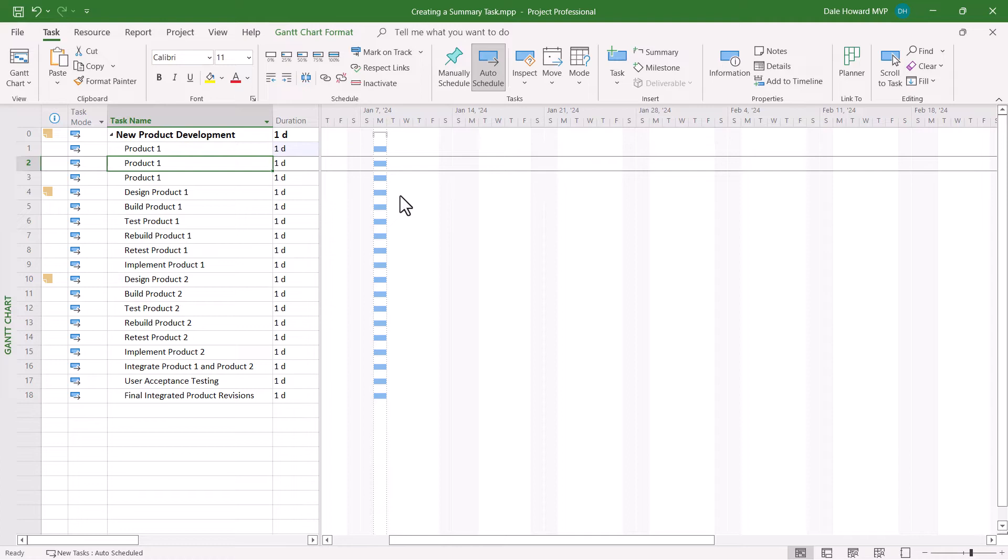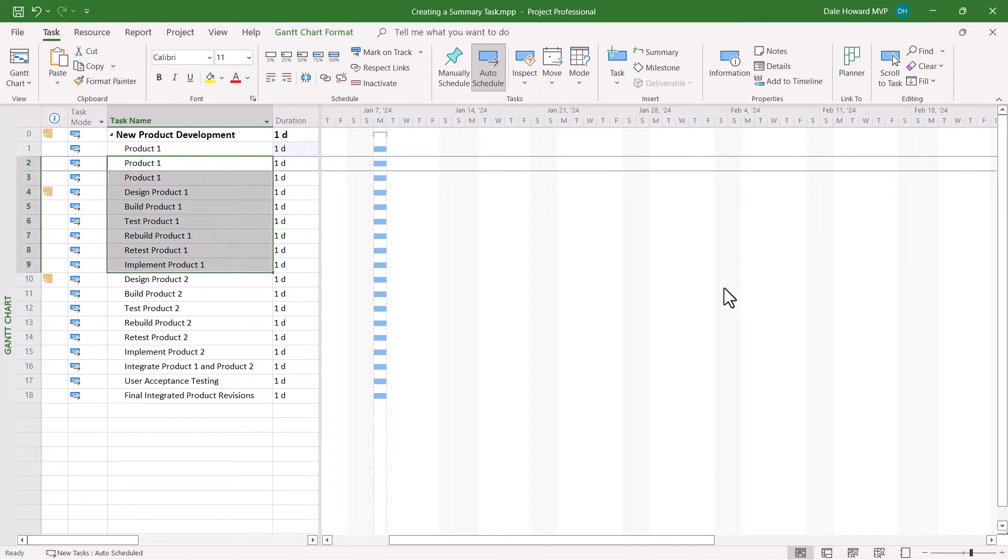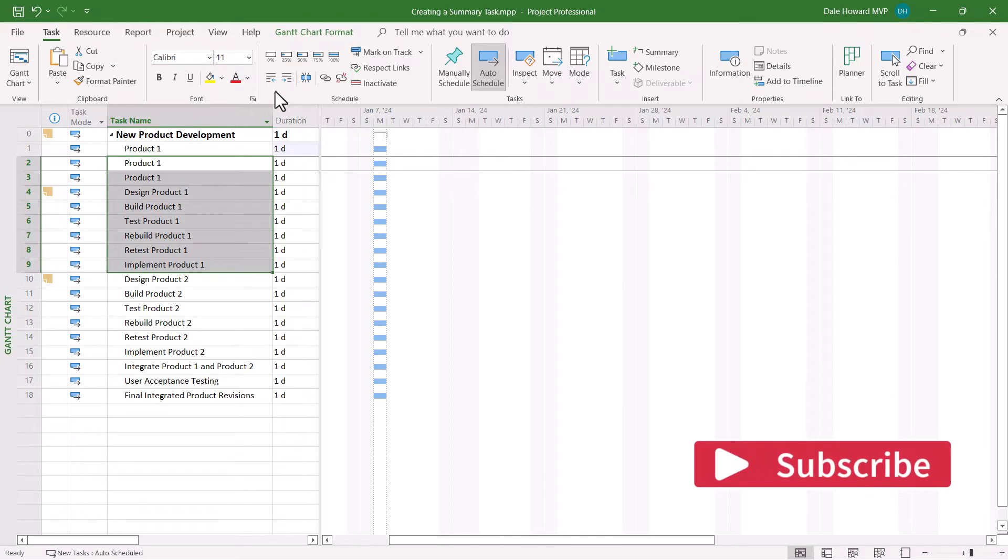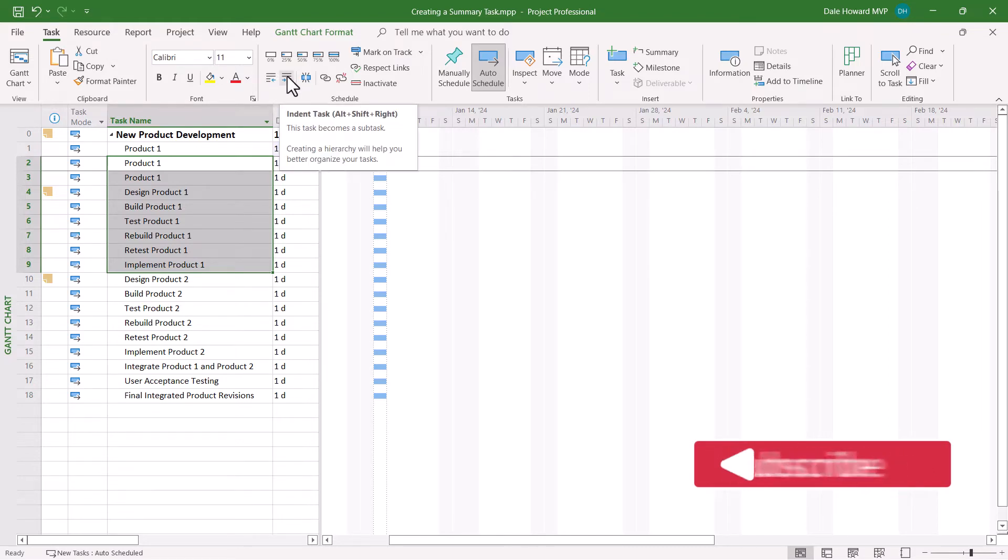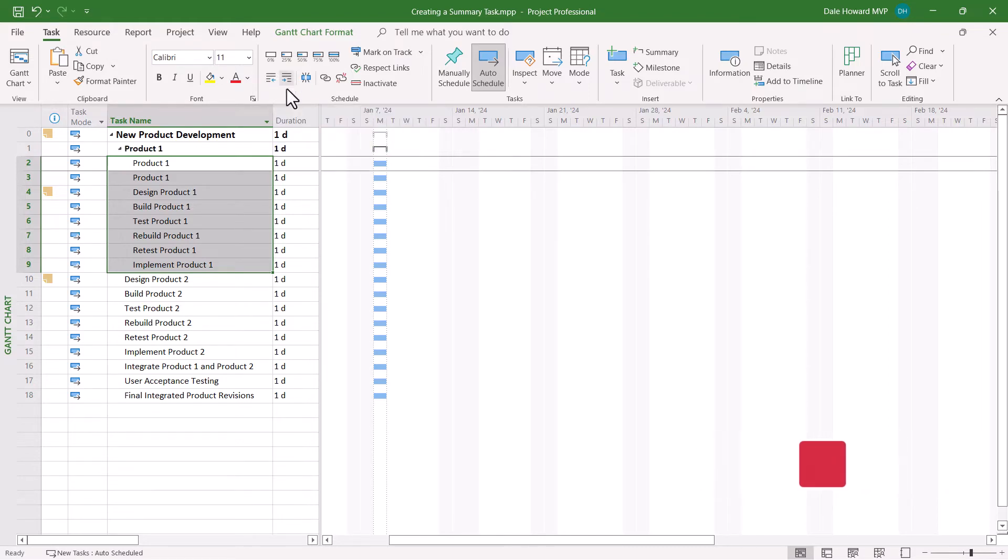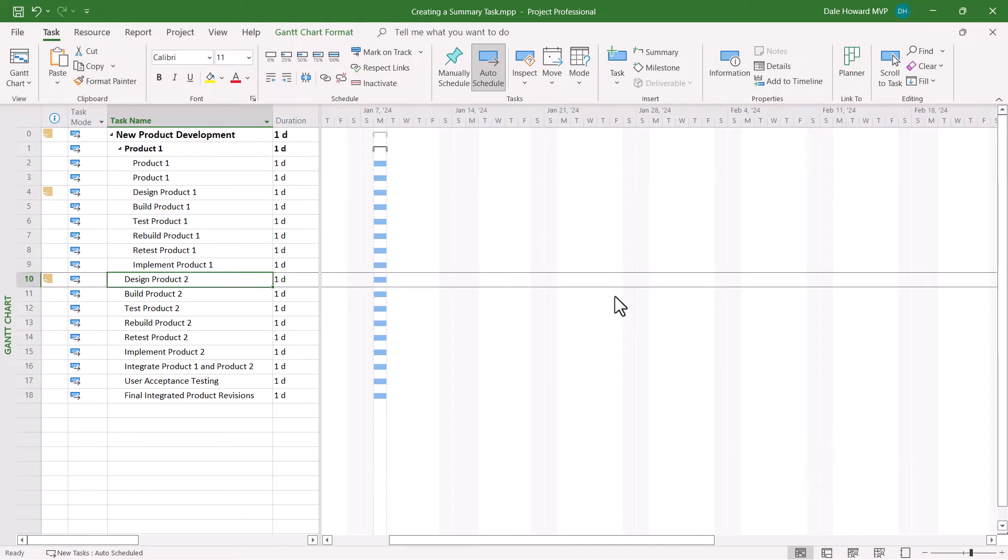Followed by that, select the tasks that you want to become subtasks of the new summary section. Then in the schedule section of your task ribbon, click the indent task button. Notice that Microsoft Project automatically converted Product 1 into a summary task and automatically indented the selected tasks to make them subtasks of the new summary section.